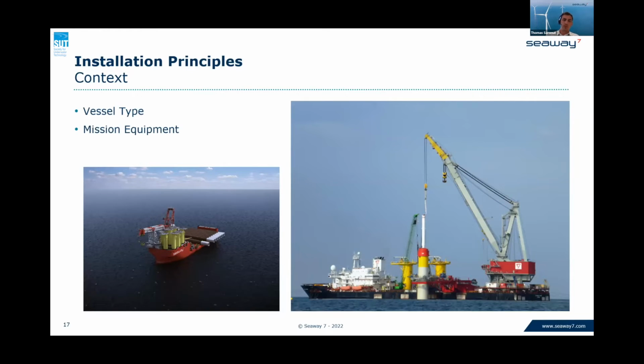You've also got things like the mission equipment on board, so that may include upending frames, hammer technologies with the sleeve, storage and handling of these monopiles and transition pieces, potentially a template for installing pin piles, and grillage.